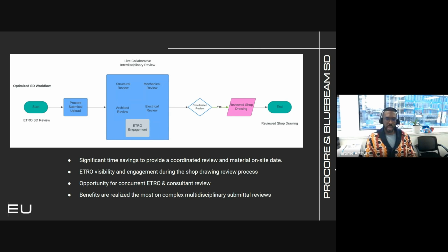One of the nicest things about this is it allows us to be present within the shop drawing review. So instead of it being a quasi black box, where you have to make a phone call to the architect to find out where things are going, you can actually see what's happening, being able to comment on things as they're occurring. The whole concept is it allows us to get a better review faster. We're able to come out with reviewed as noted rather than having comments come back, because there's that opportunity for us to comment in line.